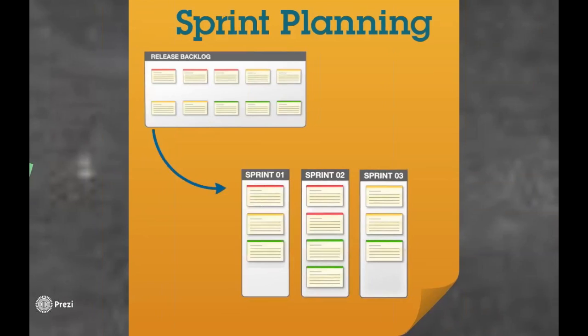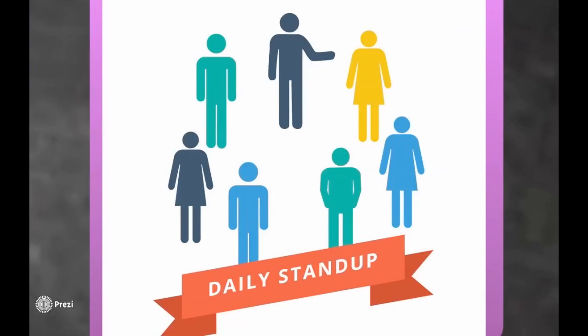And then during the sprint, you have the activity called the daily stand-up, which lasts around 15 minutes, usually in the morning, and you go all around and try to find out what was done yesterday, what am I doing today, what problems am I having.